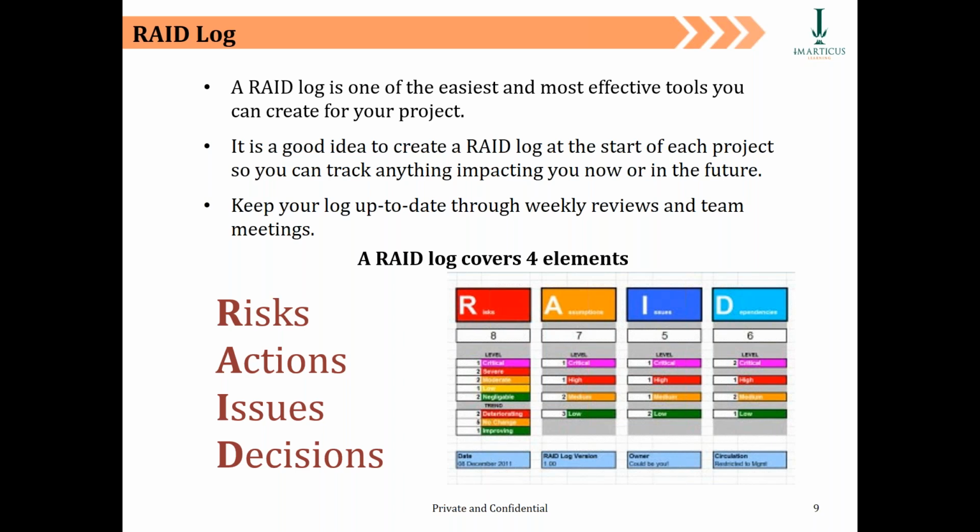Now, you know that, right? In every project, there are going to be issues: operational issues, tactical issues, strategic issues, etc. The issues where you can say, don't bother about that, I can take care of it, are plain operational issues. You apply a certain solution for it, and the issues go away. There are certain issues which don't go away just like that. That's when the issues grow and become risks. But the day-to-day issues will still be called issues. You will take a certain decision about it, and those issues can be wrapped up. So you need decisions to kill the issues, you need actions to kill the risks.